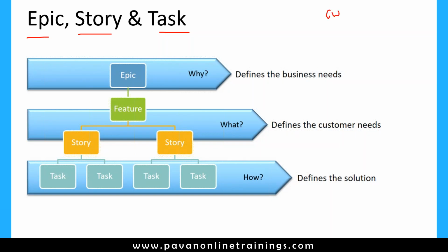Let's say there is a customer. He will create the epics, which describe their business requirements, and they will create a certain number of epics. An epic is a very high level and very large requirement. Based on this epic, we derive smaller pieces, called features, again divided into a number of stories. A story is a smaller requirement, and an epic is a bigger, larger requirement.